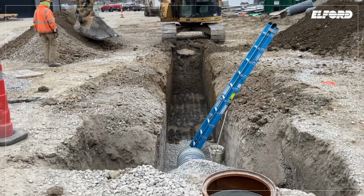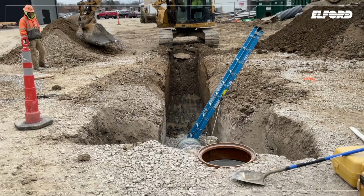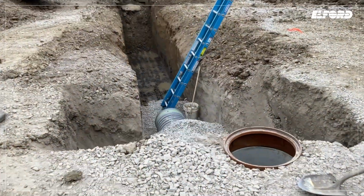If there is a potential for a cave-in, or if the excavation is more than 5 feet deep and not entirely of stable rock, the excavation shall be benched, sloped, or shored with a protective system to prevent a possible cave-in. A ladder or other egress system is required for excavations more than 4 feet deep. If using a trench box for protection, the ladder must be located within the box.